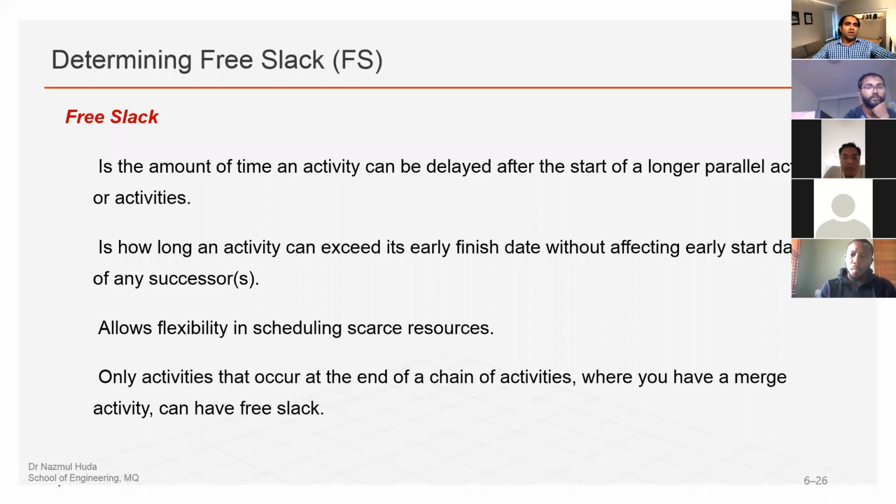All right. I should have an example here of the free slack. Let me see, but in simple words, it is related to each activity within the chain, and the total slack is for the total chain, right? Only activities that occur at the end of chain activities, where you have a merge activity, can have a free slack.